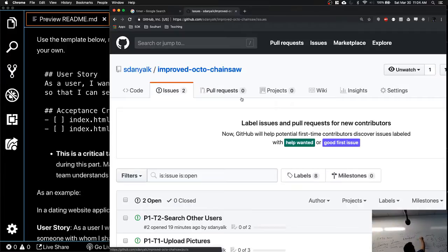3-day sprint. So you have to do how many? What can I accomplish as a team in 3 days? At the end of the 3rd day, you go back and then you start the task that you can deliver in the next 3 days, then next 3 days, right? Even if you want shorter, 2, 2, 2, make it 2 days. What can I do in 2 days?